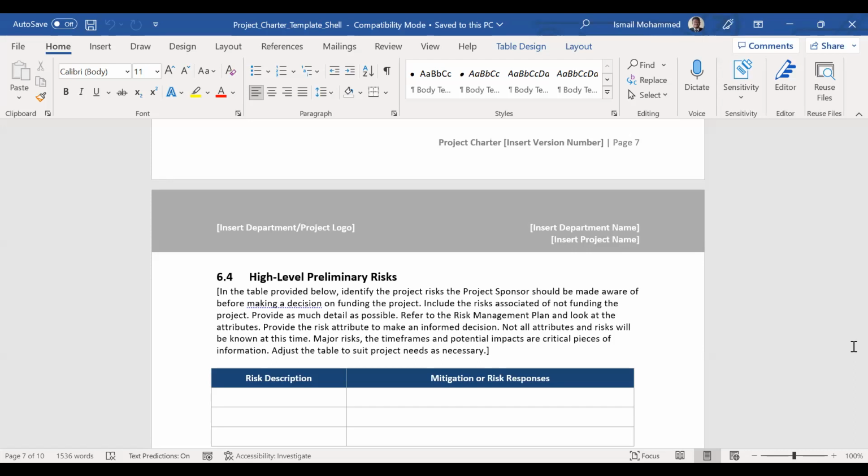That's why, Ismail bhai, the sprint backlog cannot be changed, but the product backlog can be changed. You put the requirements into the product backlog, and we can add or remove in the product backlog. But the sprint backlog, you cannot do that. This is the same in PMP also. It is one and the same, I told you, there is no difference.